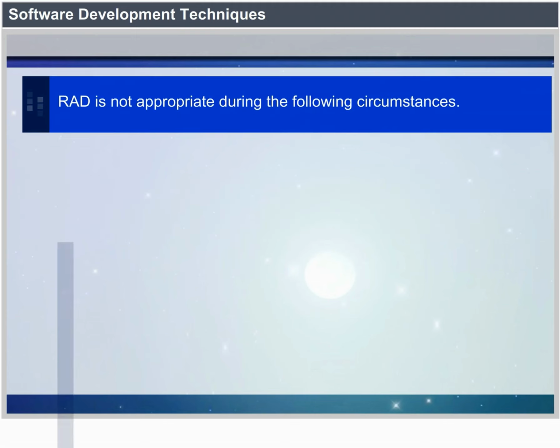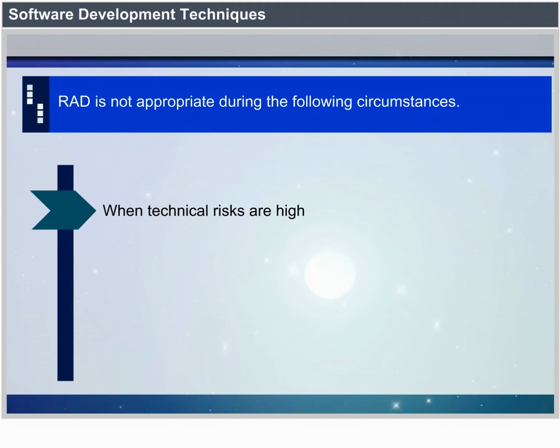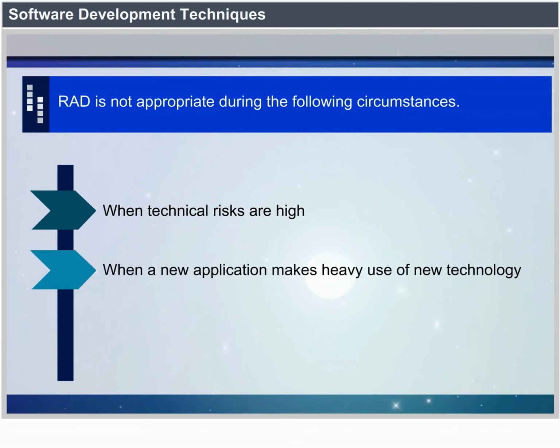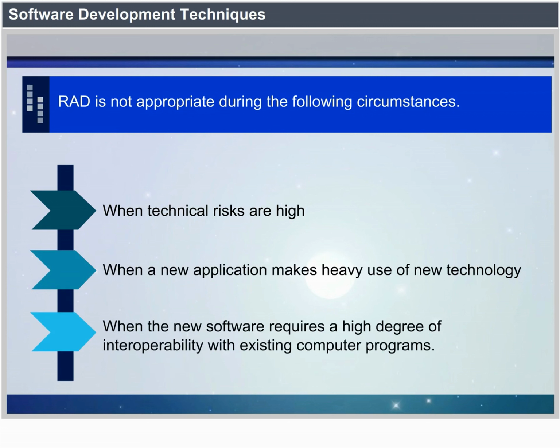RAD is not appropriate when technical risks are high, when a new application makes heavy use of new technology, or when the new software requires a high degree of interoperability with existing computer programs.